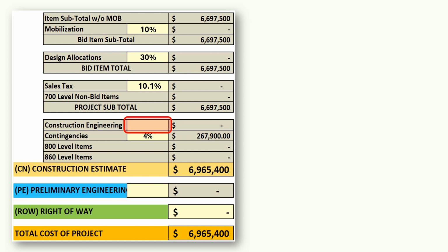Construction engineering are the funds for WSDOT's contract administration, office engineering, management, inspection, compliance monitoring, closeout, and nearly everything in the construction phase, except for the contractor's payments. This is usually based on a percentage of the contract value, and the percentage will vary by type of work and total dollar amount of the contract. See the Info CE% tab at the bottom of the worksheet for guidance.